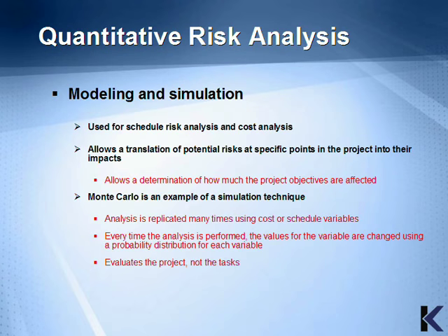Modeling and simulation is used for project schedule risk analysis and cost analysis. It allows a translation of potential risks at specific points in the project into their impacts, and allows a determination of how much the project objectives are affected. The Monte Carlo is an example of a simulation technique.